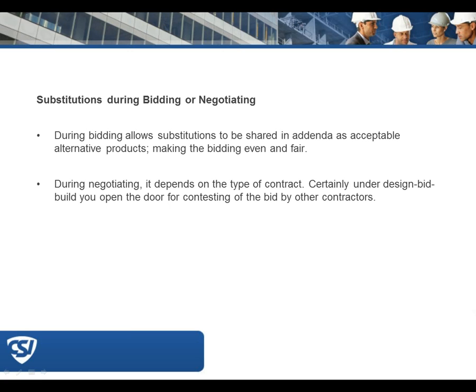So whether or not there are large subs involved, it would still need to come through those that hold the contract to make that certification. Now, the general contractor probably isn't going to understand what they're looking at, but that's not the point, and they're held to be accountable as if they did understand once the document, or the product, is reviewed and certified.